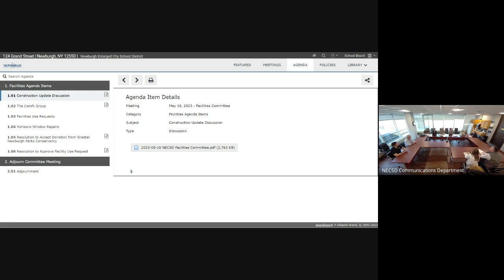That's great news. Okay. Vales Gate, could you talk about what you guys have done there the last month? So at Vales Gate, not much has gone on due to the reconfiguration of the space of the new addition. However, we were able to complete the odds and ends on the outside, like caulking the windows and the roofing system. Again, we had a couple of days where we were able to get inside the building and do some ductwork and some electrical upgrades as well. But as of this past Monday, we are back to work full speed with all the contractors, and all of the changes that were made are being implemented. All the CMU walls are being erected inside. All the door frames have been changed, and that's about it.